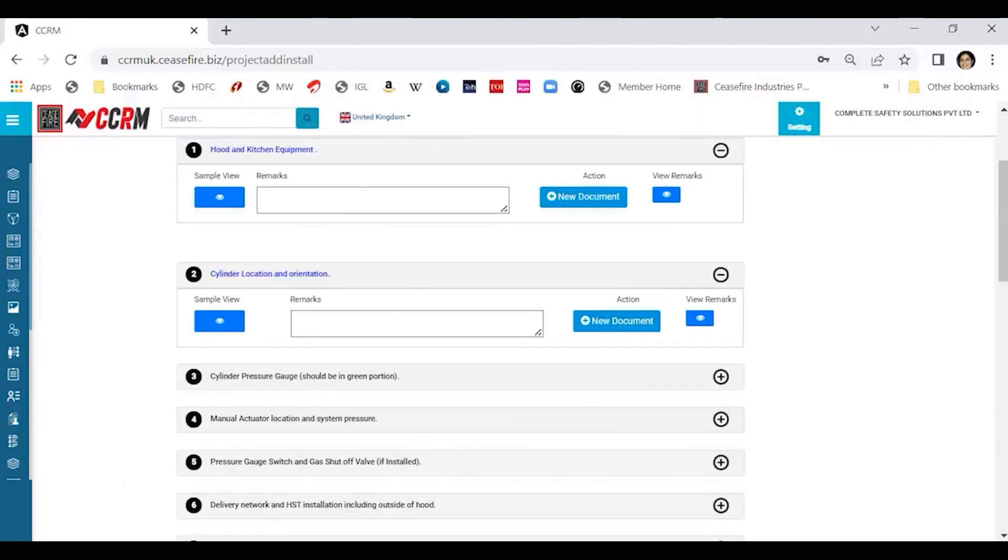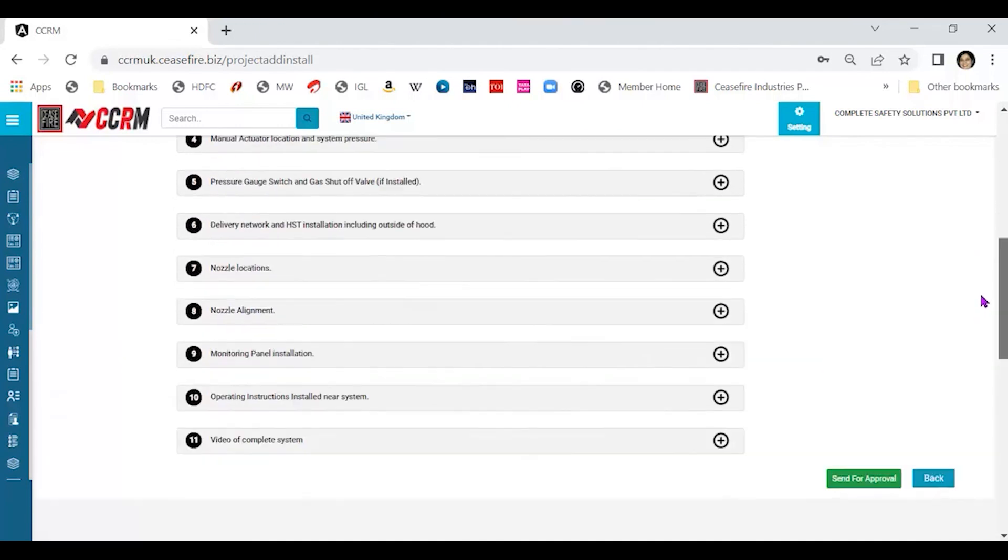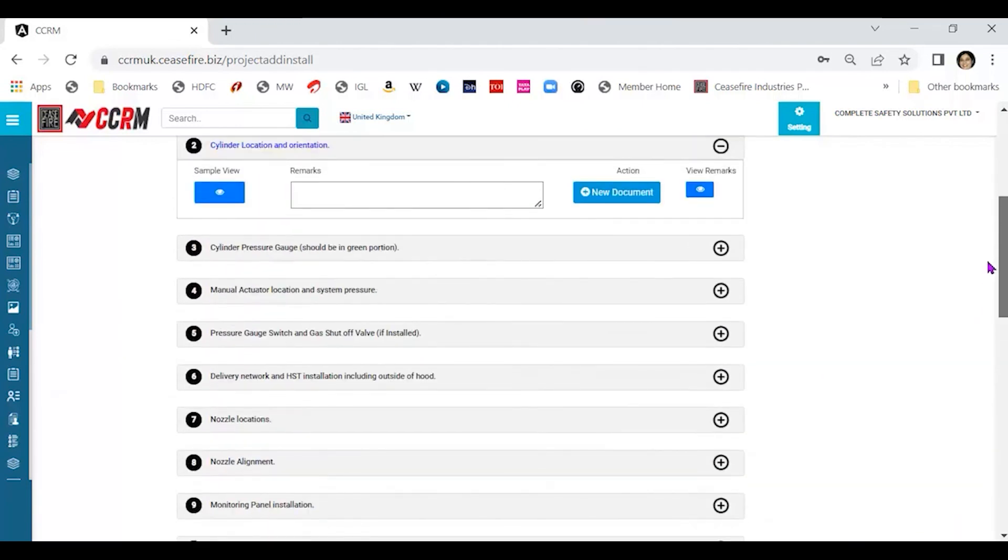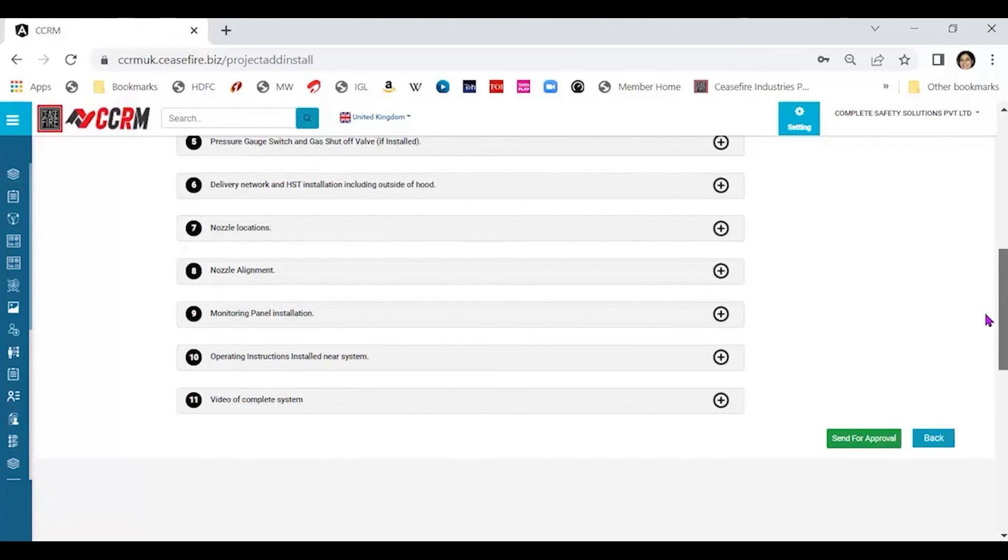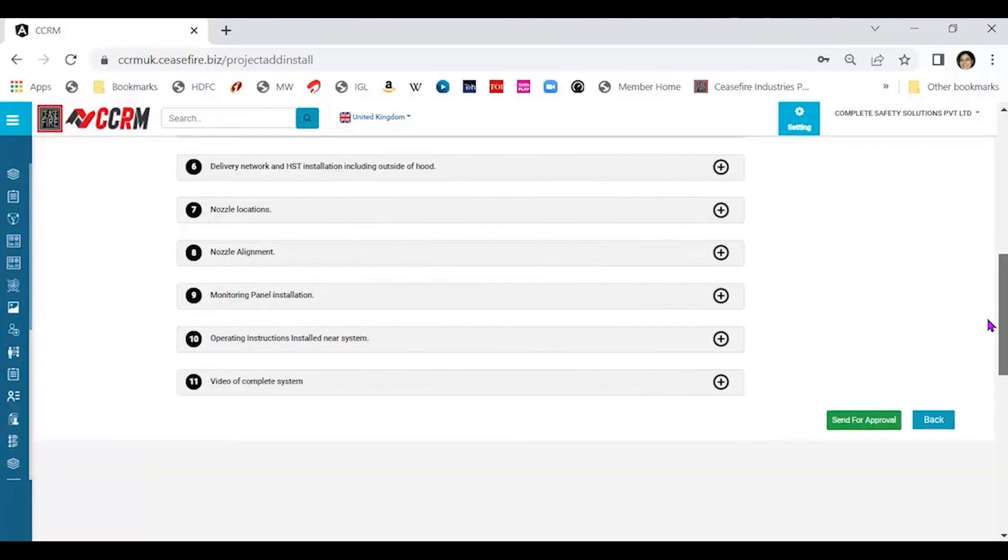Similarly, you need to upload all the photographs here. Uploading each photograph is mandatory. The last is a video and you need to complete the video part of it. That means you need to click a 2-3 minute video and upload that video over here.